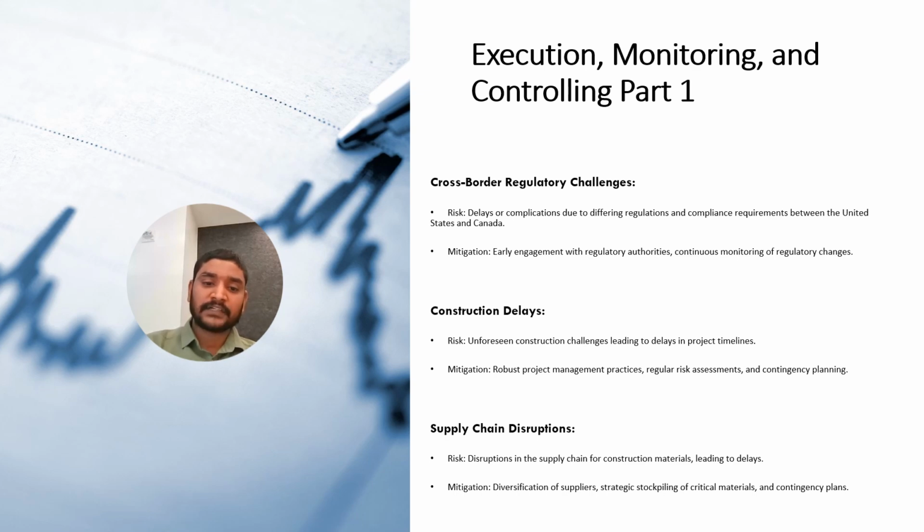And supply chain disruptions. Risk: disruptions in the supply chain for the construction materials leading to delays. Mitigation: diversification of suppliers, strategic stockpiling of critical materials, and contingency plans.